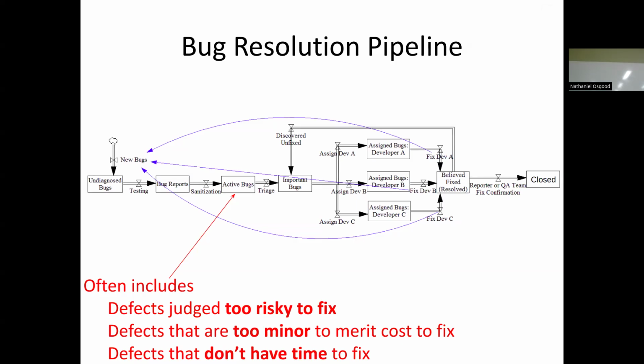I think I have the statistics here, but it's a large fraction. If they require 10 or fewer lines of code of changes, they introduce new bugs 20 to 30% of the time. If it involves like 100 lines of code, the chance of introducing new bugs is way up there. It's like above 50%.